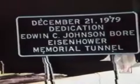Eventually, 2.5 million cubic yards of rock were excavated at a cost of seven lives. In 1973, 3 years behind schedule and 100% over budget, the westbound tunnel was finally completed. 6 years later, in 1979, the eastbound passage followed suit. Total cost, $262 million.